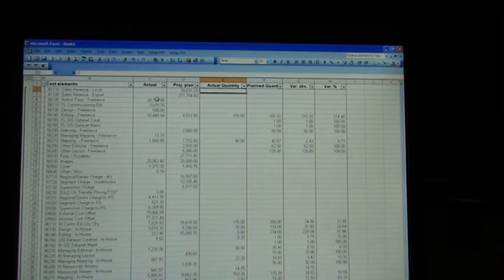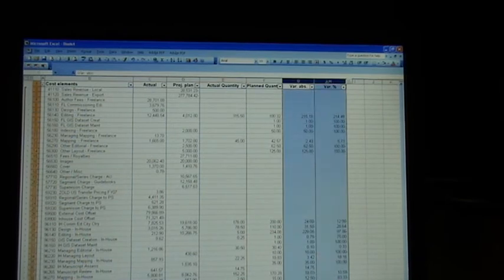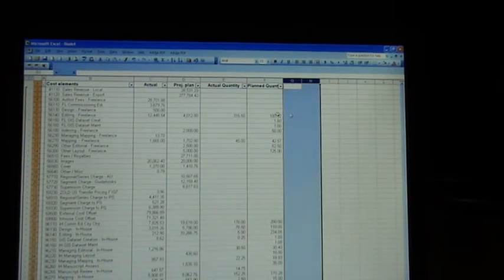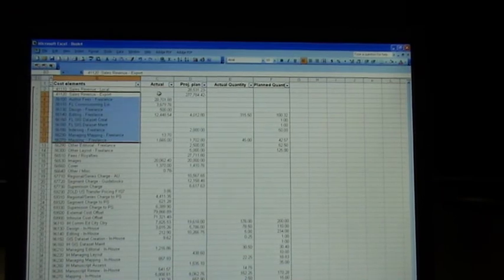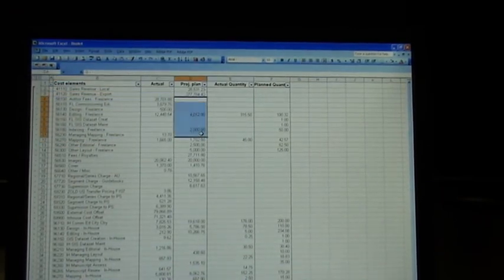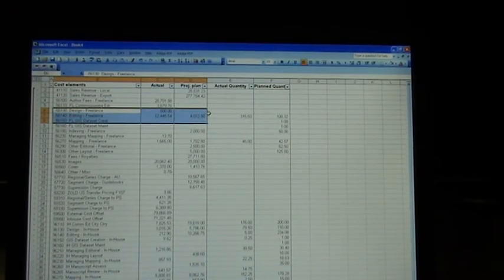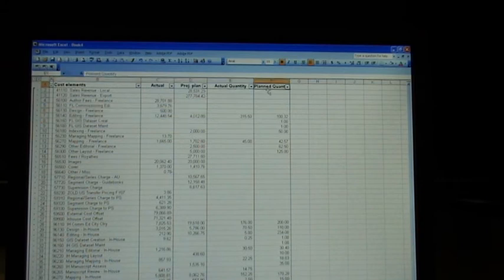And then when it gets to the third lots of cost element you can delete that, but what it will bring is actual quantity and plain quantity, and that's your hours. So this is your dollars, that's your hours, then you can delete the variance at the end. So you end up with cost element, actual project plan, which is the first three columns of the report, and then you can delete everything except actual quantity and plain quantity.